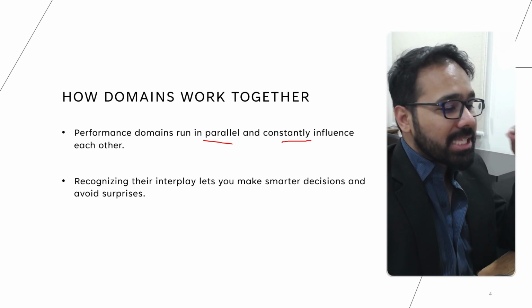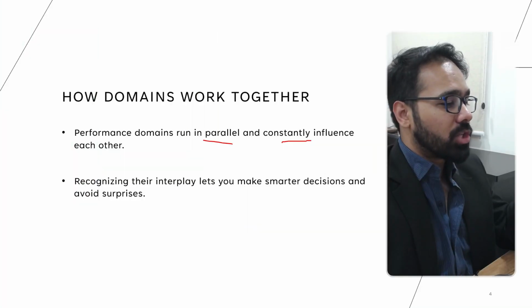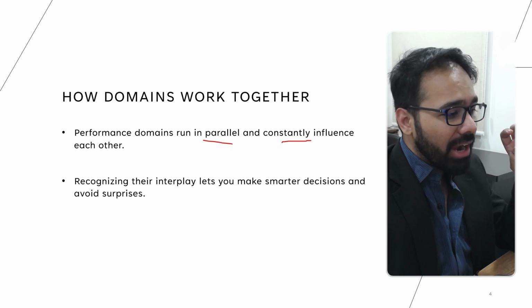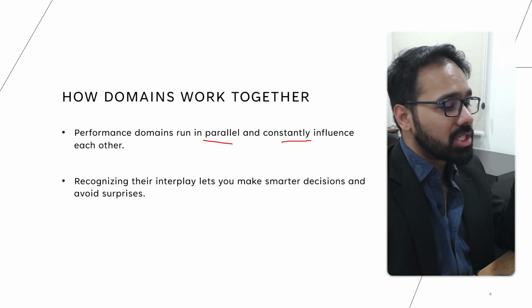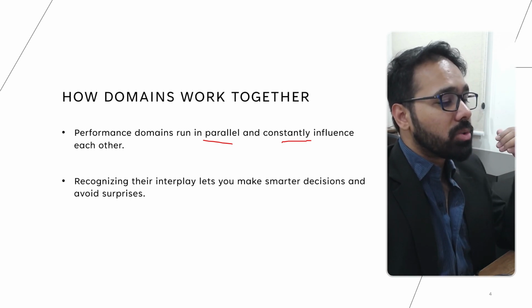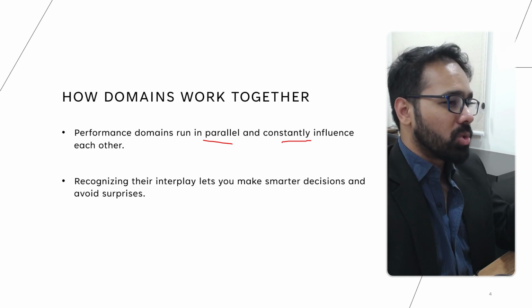So, just a simple stakeholder request that was basically a request to change in your plan affects 3 different domains. You have the stakeholder domain, the planning domain, and then the project work domain, which is the actual execution. So you have to spot these interactions early, which is going to keep you ahead of any curveballs that the project is going to throw at you.